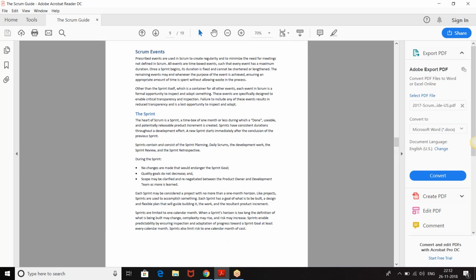All right, any other question? Please shoot. Basically, what is the optimal development team size, excluding the product owner and scrum master? Around five should be good, right? No, no, include them. Usually the development team size would be 3 to 9.